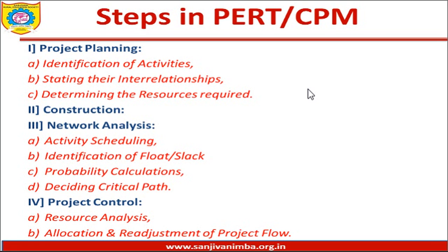And thirdly, in project planning you'll have to determine the different resources that will be required to complete the activity. Sometimes you will require manpower, sometimes you'll require technical assistance, sometimes you require some outside services, you also require some time and financial resources. So these are the resources that would be involved in the process of organizing or conducting an activity which is a part of a project. So that is one of the essential things to be considered in project planning, that is determining the organizational resource requirements. Once you are clear with this, you have ended up with project planning.